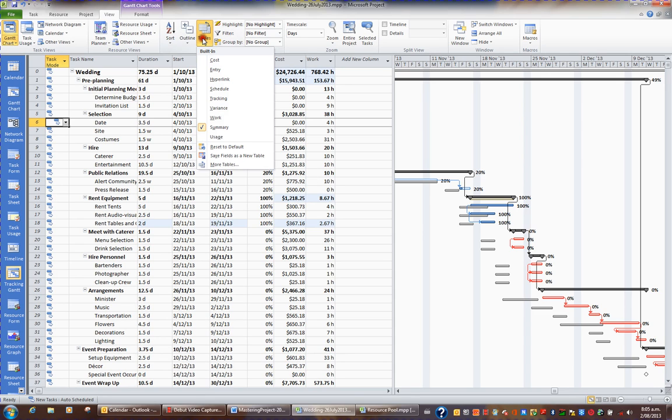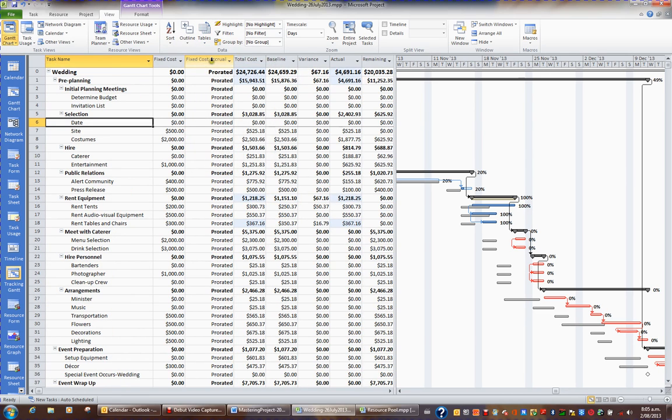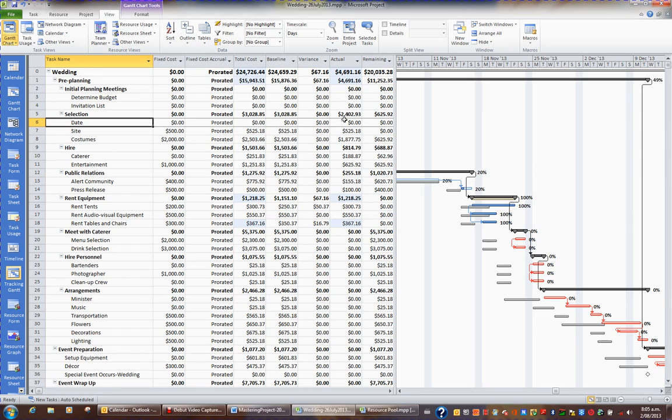Another interesting table that you may want to have a look at is Cost. Here we have, for example, the baseline cost and the actual cost. And this is what the project has actually cost me so far, and the remaining cost.